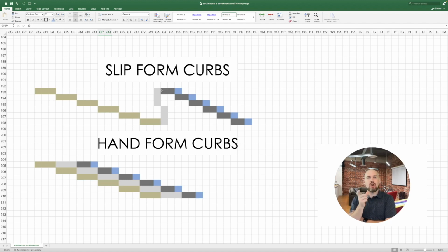We could pick a small crew and hand form the whole thing. And it would be about 3 of those same blocks for each one of those areas. Yeah, actually this works really nicely. And it actually helps us with our manpower account, because we're worried about having all the people dedicated to do that work. So yeah, that actually works.